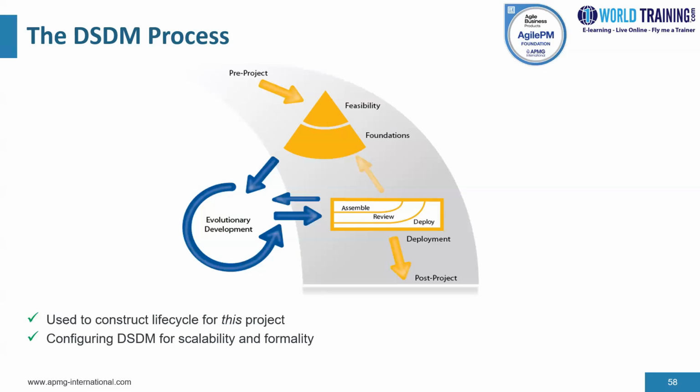It requires the solution development teams to apply practices such as iterative development, time boxing, and MoSCoW prioritization, together with modeling and facilitated workshops, to converge over time on an accurate solution that meets the business need and is also built in the right way from a technical viewpoint. Working within time boxes, the solution team members create solution increments, iteratively exploring the low level of detail of the requirements and testing continuously as they move forward.